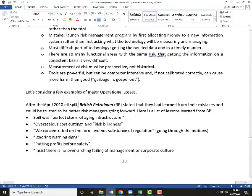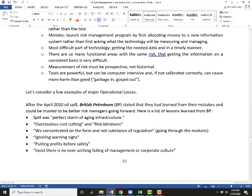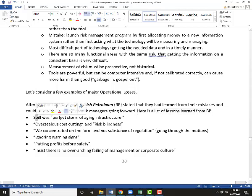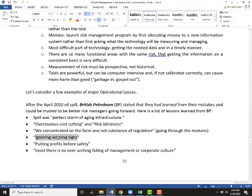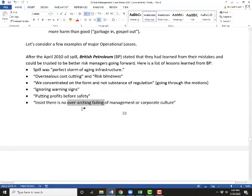A few examples of operational risk: I like this British Petroleum one. In 2010, British Petroleum had a major oil spill. I read an article about BP saying they had all these lessons learned — they said the spill was a perfect storm of aging infrastructure, because they weren't taking care of their machinery due to a focus on cost cutting. They had a risk management process but it was more form than substance — just going through the motions. They had some close calls, some near-big accidents that they ignored — good warning signs. They were too focused on profits more than safety.